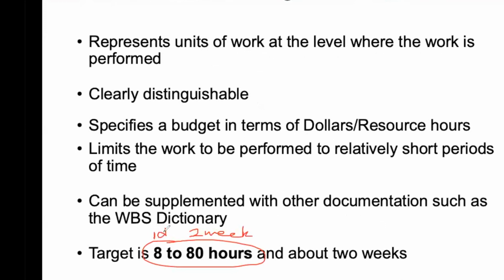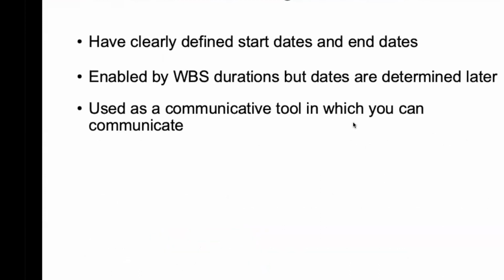If it's more than 2 weeks to do it, the work package, probably you can subdivide it. So I want you to subdivide it into 2 things, right? If it's less than 8 hours, which is 1 day, it's probably not a work package. You should consider it as an activity. Okay, so the 8 to 80 hour rule is a rule of thumb to come up with your work packages.